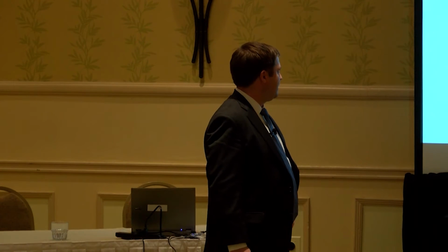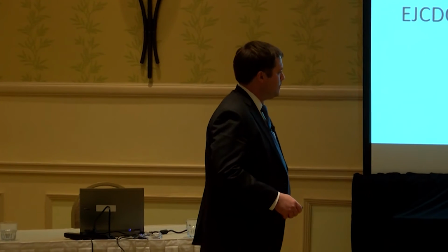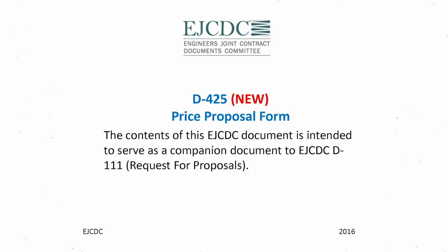And we've tied this here to a couple of examples that are also included in the form, as it provides reference to our EJCDC 520 stipulated price or the 525 cost plus contract between the design builder and the owner. So after the RFP document, the next sequential one in steps is the price proposal form, which we provide that would be included in the RFP and provides the formal, this is how we want the prices set forth when we get the bids for consistency between potential bidders.